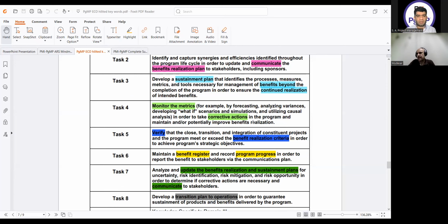So we are talking about the corrective actions here. Preventive is something which has not occurred, but for corrective actions we already know the plan and what the actual is. Then you do the gap analysis. You remember I use the word gap analysis. Gap analysis we are doing for corrective action, and based on that some plans will also be updated in the program lifecycle.